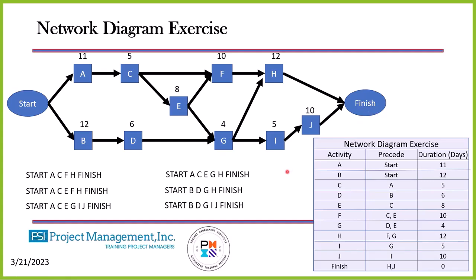What I want to do is determine the critical path. The critical path is the longest path through the project. Based on the start date, the critical path will define for us what the end date of the project will be. If any activity in the critical path is late, the project will be late. I also have near critical paths. Near critical paths we also have to manage very closely, because if anything slips in a near critical path, it could soon become a critical path item.